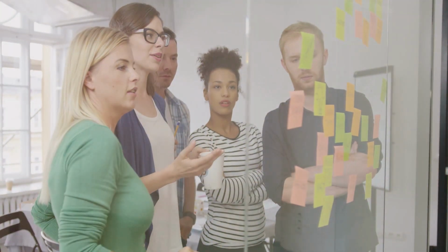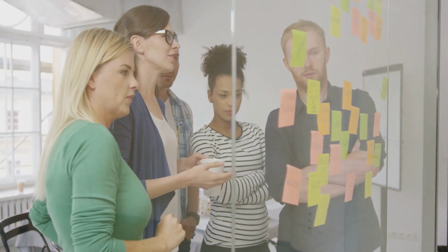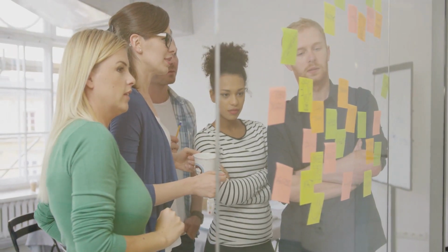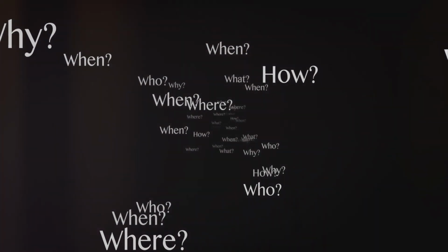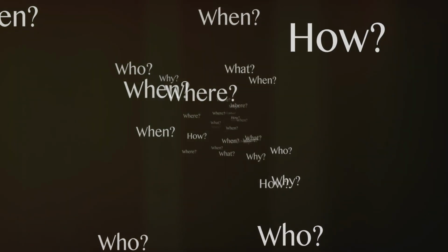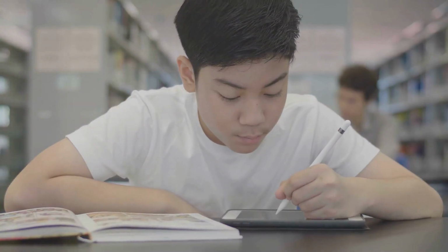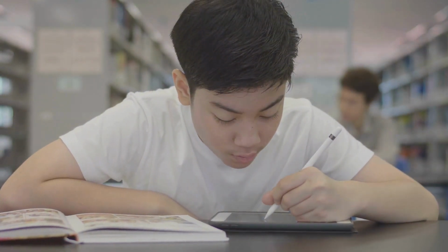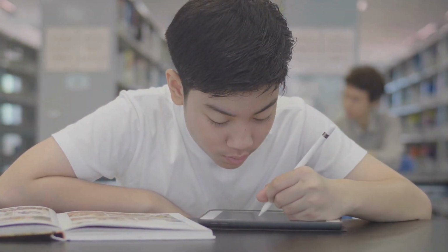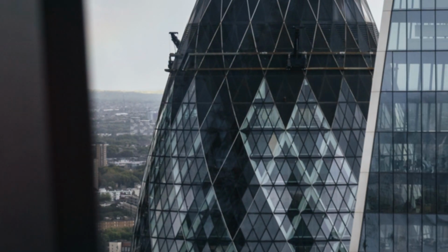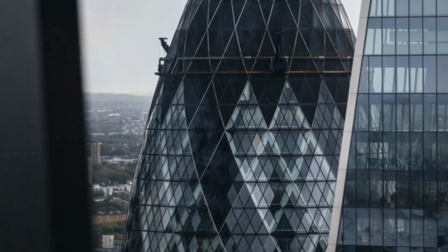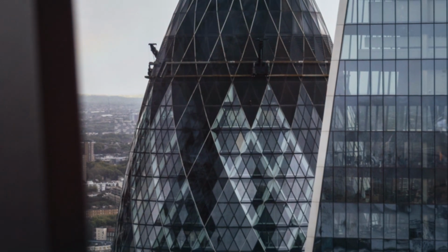One popular approach to writing acceptance criteria in Agile is using Gherkin syntax. Gherkin uses keywords like given, when, and then to describe the system's behavior. For example, a user story for a library system might be, as a library member, I want to search for books. The acceptance criteria in Gherkin could be: Feature: Search for books. Scenario: Search by title.